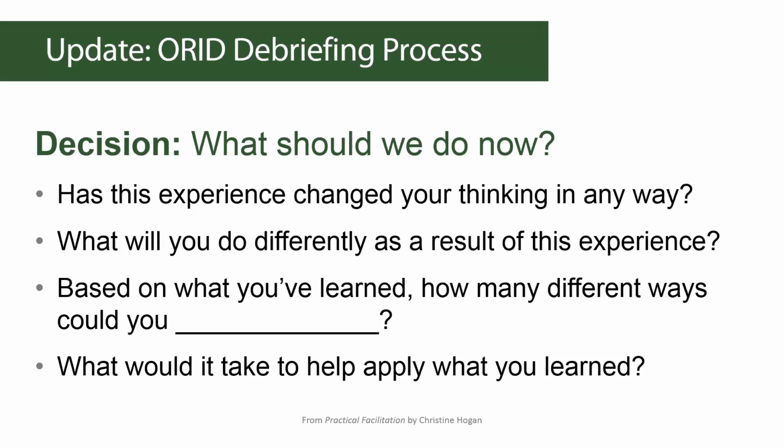You don't have a lot of time to prepare. You don't really know what's gone on, what to expect. If you remember the ORID steps, you have a few minutes to make yourself an outline based on those steps and think about, in each category, what questions am I going to answer to get at the results, the understanding that I need to gain, or that I need to help the team gain. Then I think you'll find that the ORID is applicable in a very wide range of circumstances.